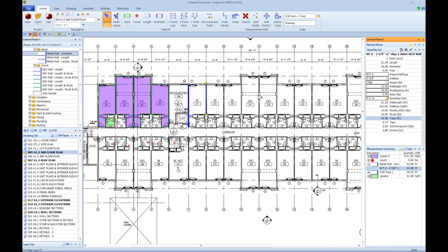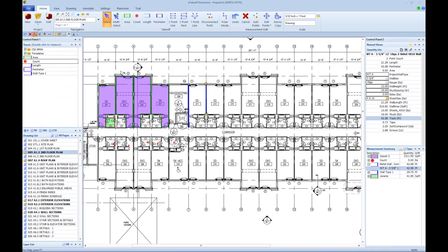You can take an assembly item from Sage, drop it onto one of these traces, and it'll build that exact assembly, name it, and give it a specific type, like length. If I had a wall assembly in Sage Estimating, I could drop it on this length and it would create that exact assembly, that trace in here with the assembly items in it automatically. Pretty powerful stuff. And then you just map it, measure it, and send it back on over to Estimating with all your quantities. Okay, that is the assembly function.